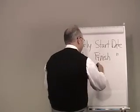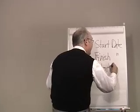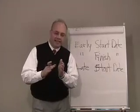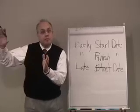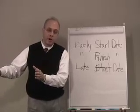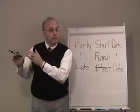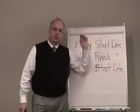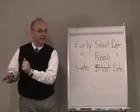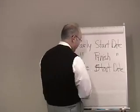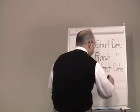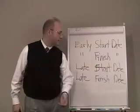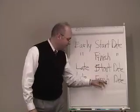Another calculated date is the late start date — the latest date any activity could start and still finish by the date established for completion of the project, typically the contract completion date. The late start date is the latest we could start and still finish by the anticipated date. Similarly, the late finish date is the latest date we can finish the activity and still complete the project on time. Essentially, the late start date plus the duration of the activity equals the late finish date.